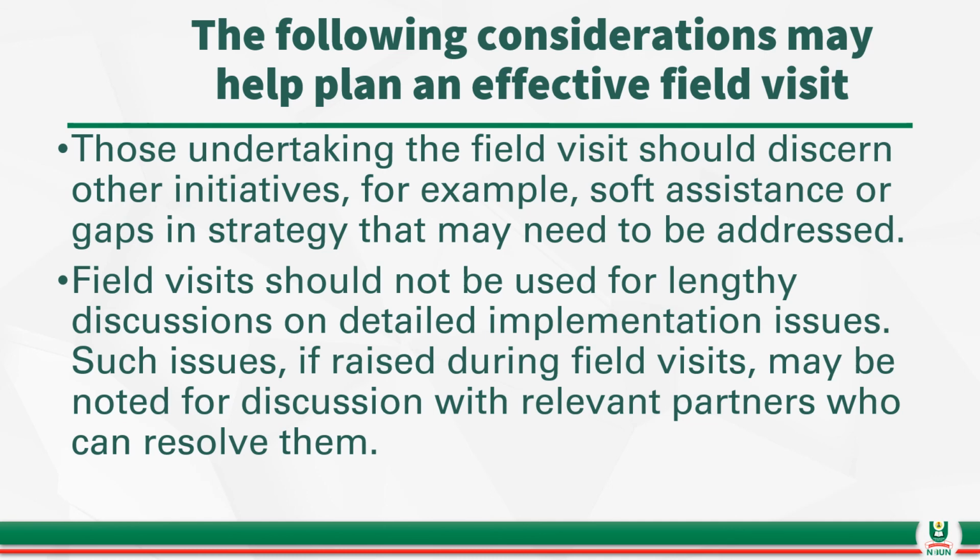For any implementation issue, yes, the issue can be raised during the field visit, but it has to be noted for discussion with the relevant partner who can resolve it. It is not during the field visit that you start resolving implementation issues, because it will take a lot of time. However, the issue can be observed and raised, and it can be discussed with the relevant partner outside the field visit, because the visit must not be lengthy.